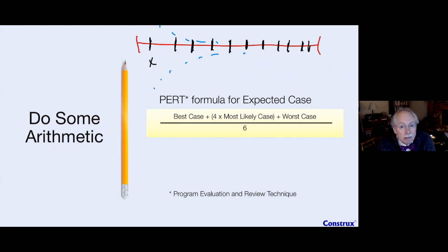where I never need to update my promise except to bring it in, which no one ever argues. Well, I will be updating my planning number, because we will learn things about the project and I will learn what's going on. And so we'll have multiple opportunities to re-estimate and reset that planning number to reset our true 50-50. And what we'll typically see is that it'll approach our promise, and hopefully we'll still deliver within or before our promise number. So this is going to be an ongoing activity.